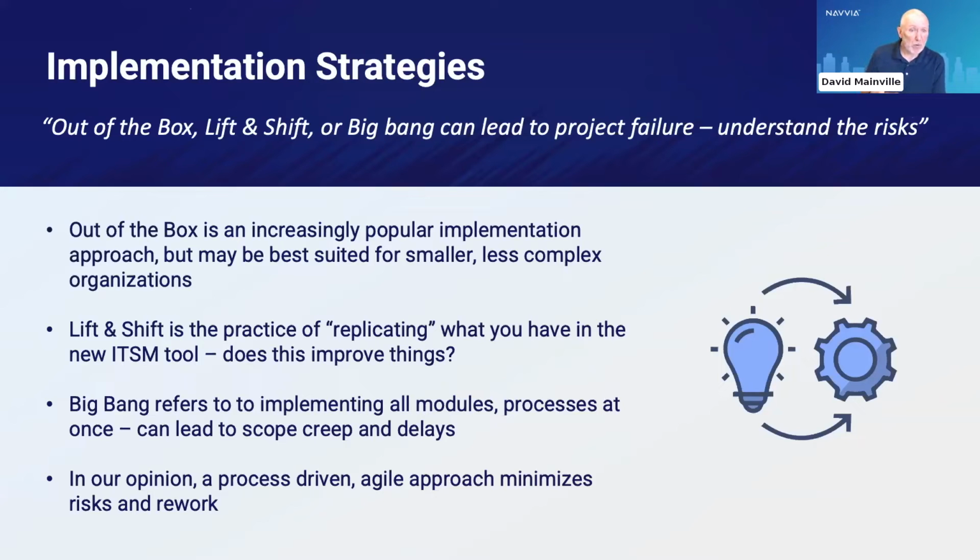Big bang is also something, and I think someone referred to it as biting off more than you can chew, or too large a project. But we've seen organizations try to implement everything all at once. And this is a recipe for disaster. It can lead to a lot of scope creep and delays. So it's best to do things in a more phased approach if you can. It might require you to live with a couple of tools for a while as you move everything over. But big bang is often a very difficult way to address an ITSM tool implementation.